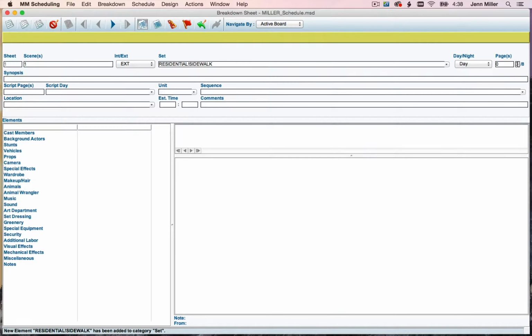Now, you might remember that the smallest unit of measurement is 1/8, and the highest is 8/8, which would be 1 page. If you have more than 1 page, let's say you have only 1 scene for your entire script and your script is 2 pages long, then you would put a 2 for 2 complete pages, and let's say it goes 1/8 onto the 3rd page. So that would be the length if that were all one scene, okay? So this scene is only 3/8, this is a 0.